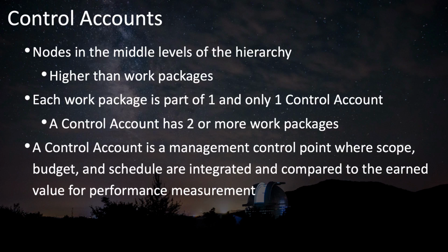A control account is a control point within your hierarchy where the scope and the budget and schedule are integrated so that you can measure performance of the project using earned value analysis. In other words, you will want to know how well you're performing on your project, not just overall, but for specific portions of your project. And having these control accounts at certain points in your work breakdown structure will help you to appropriately organize the different sections and work packages into something that you can measure performance and report on performance.